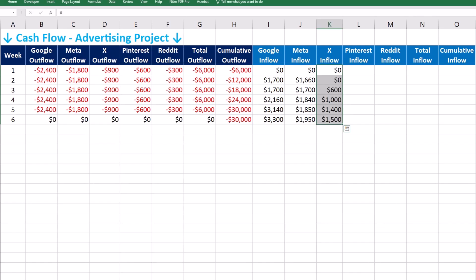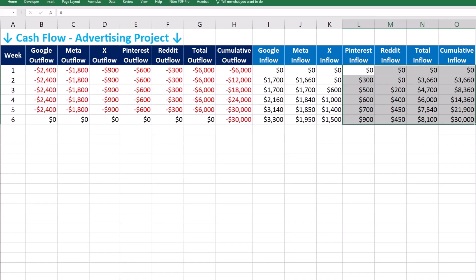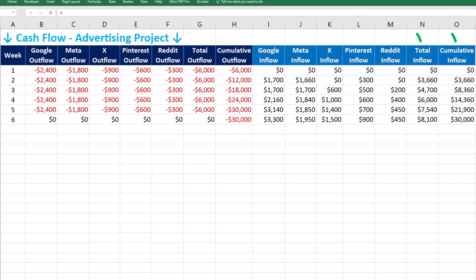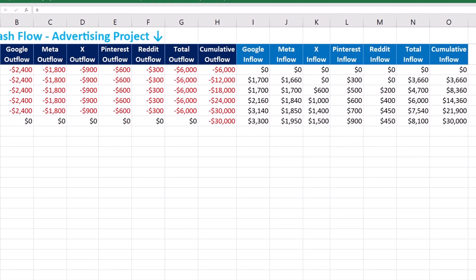The lag period for X is two weeks, and the first inflows appear in week 3. Pinterest and Reddit have lag periods of one and two weeks respectively. Total and cumulative inflows are calculated in a similar way in columns G and H.